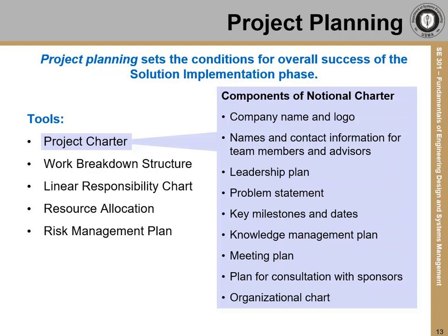The knowledge management plan is one of the more important parts of the charter in terms of impacting project performance. It lays out standards and expectations for documentation, communication, and record keeping. Standardizing how the team will name files, where they will store them, and how the file directory will be structured will pay huge dividends in terms of efficiency in compiling project documents later in the project cycle, especially for large and longer-term projects.